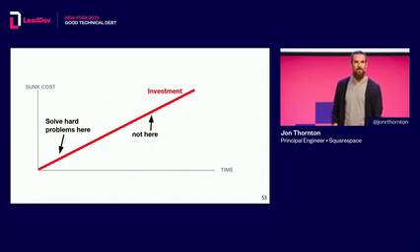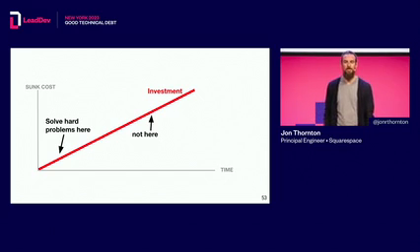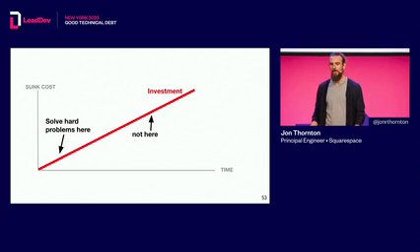The order that we build things in matters a lot. It's better to train the monkey first, before we spend any time building the pedestal. If we succeed, then it's straightforward to build the rest and get our project across the finish line. And if we fail to train the monkey, then at least we found out sooner than we would have if we built the pedestal first, and we can take that saved time and go do something more productive with it.